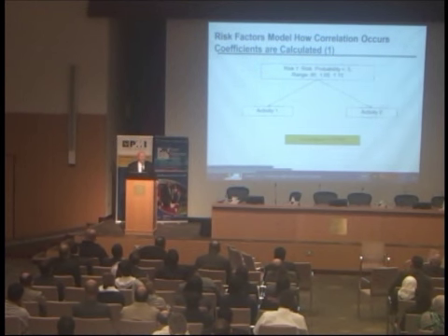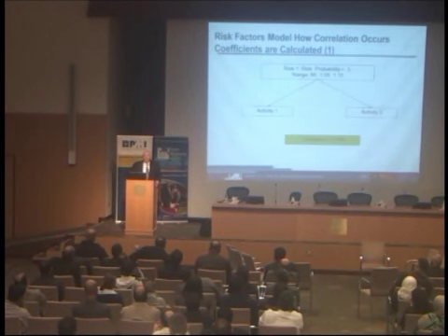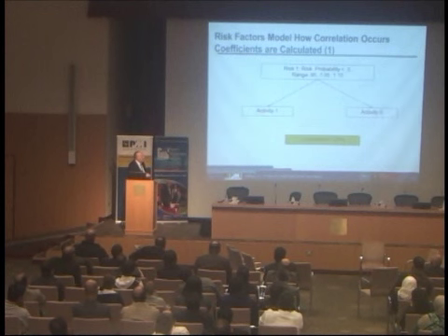Well, if you've got the risks and one risk affects two activities, they become correlated. That's the genesis of correlation. So now let us just say that we're going to do that modeling in the Monte Carlo simulation. And if this one risk, whatever the parameters are, affects activity 1 and activity 2, they become correlated.